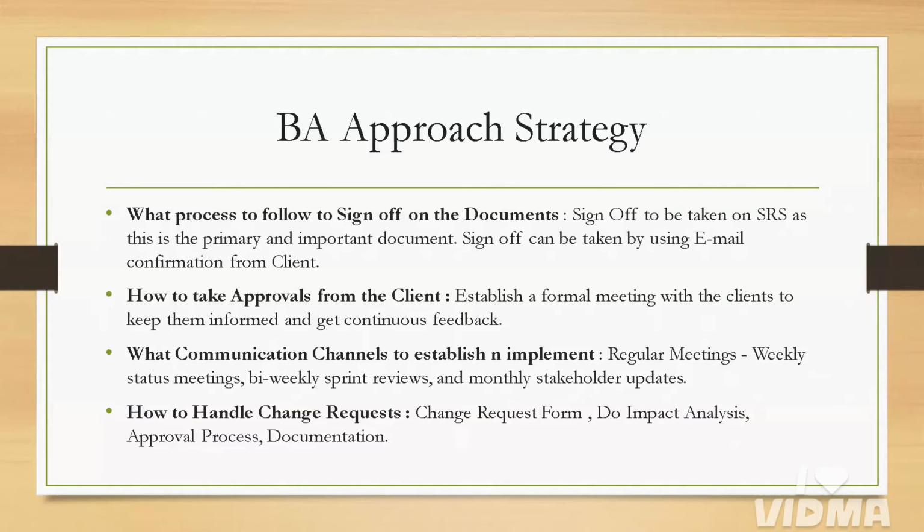Estimation and impact analysis means how this change request will impact the current system which is being implemented. Okay. So how much impact it will create to the system, and estimation like how much time and duration it will take, and will it increase the budget or not. Each and everything will be calculated. And a feasibility study also, whether we do have the resources or not to implement that feature in the system.